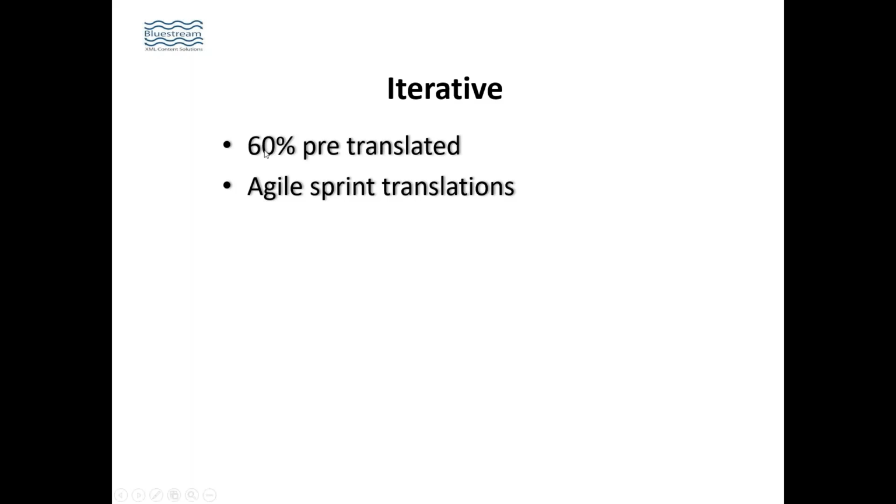So what you do to avoid that is you translate ahead of time some portion of the content that you've finished, and then send the rest out when you're ready. And so it'll be a quicker turnaround by the LSP. The basic idea here is every topic has a certain time required to translate it.